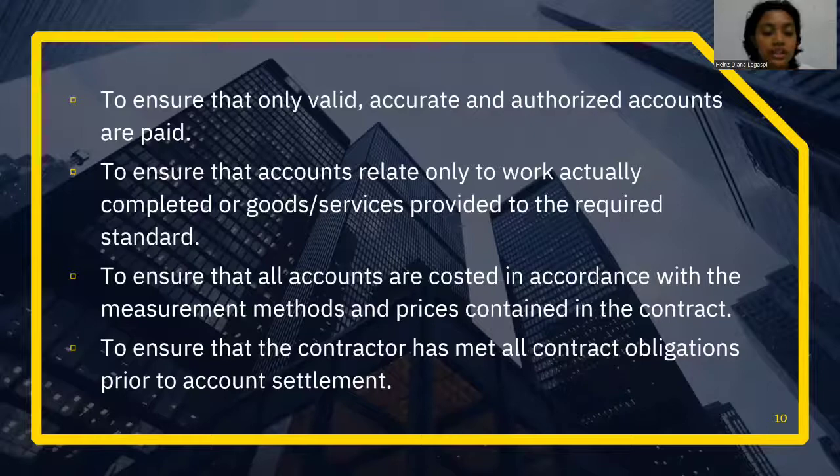Next one, to ensure that accounts relate only to work actually completed or goods or service provided to the required standard. Like what I've said a while ago, that you will only pay for the work which is completed and of quality. Next one, to ensure that all accounts are costed in accordance with the measurement methods and prices contained in the contract. Payments must be made with the standard method or price computed which are included or stated in the contract.